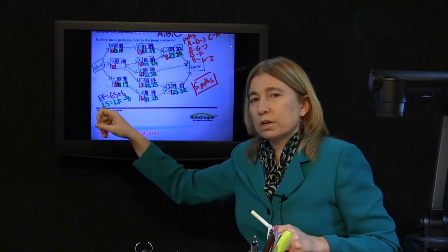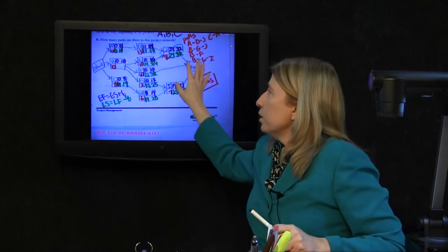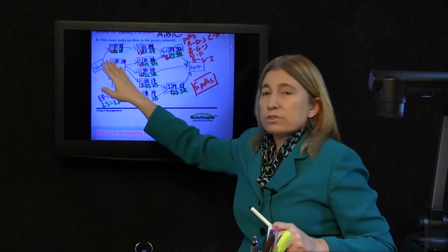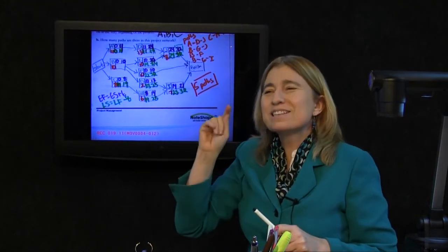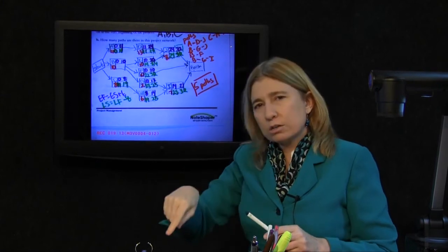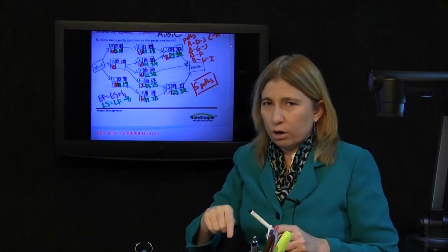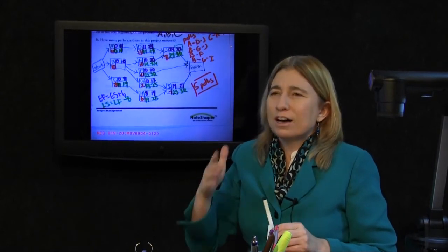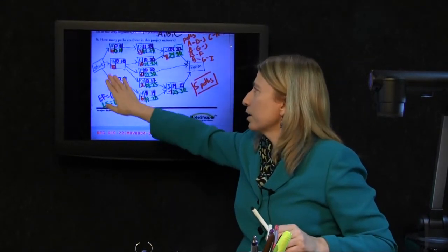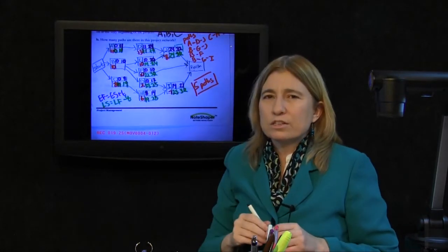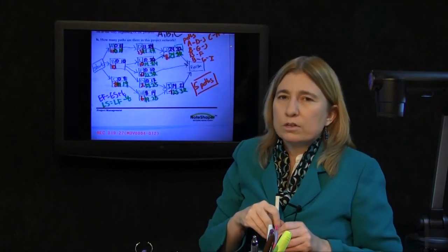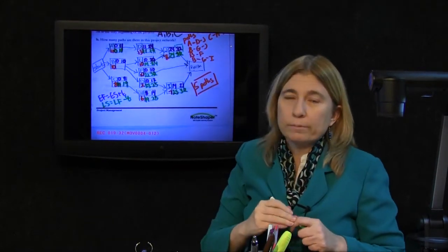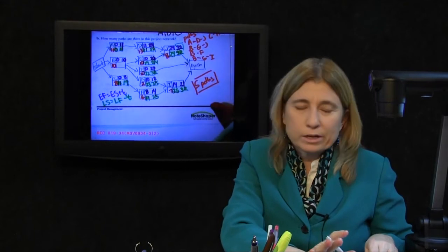Sometimes this arithmetic can get a little tricky. When you are working your way back, at least one of the activities that's attached to the starting node needs to zero out. The late start time needs to be 0 or result in 0. And why do I mean it needs to be? Because if you have no activities at the starting node where the late start time is 0, that's a signal that you messed up the arithmetic. Okay, so good. I see at least one. We're probably still on track.